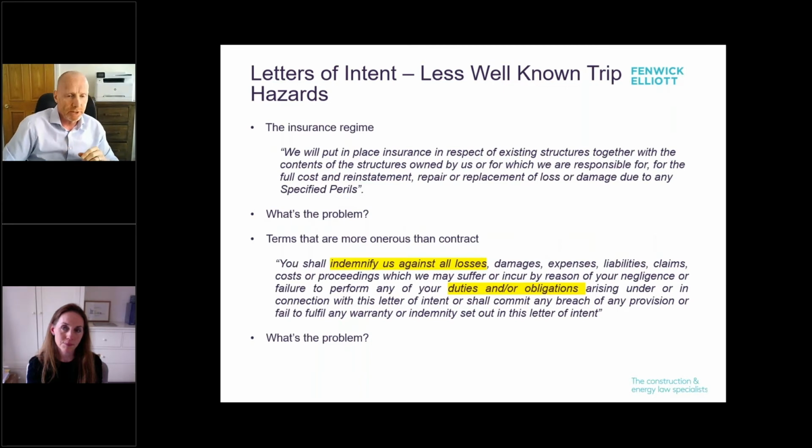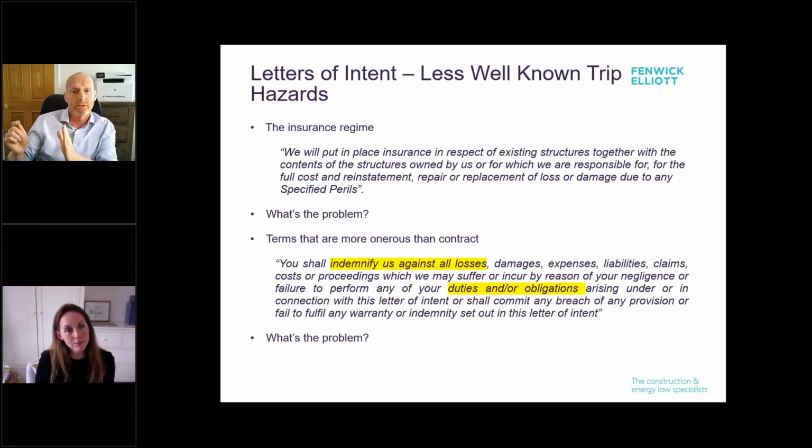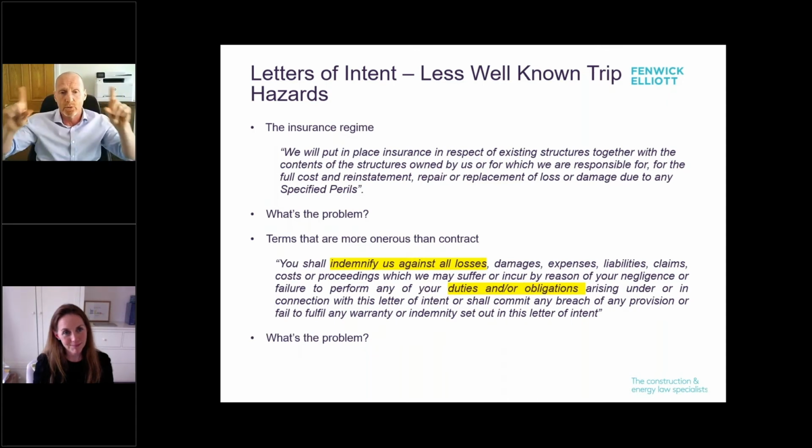Touch on now, again, back to Lucinda's point really about this 120 pages of a building contract is there for protection. So Lucinda mentioned the fact that it's nice to have in there a little bit of limit of liability you might try and squeeze in if something goes wrong. The thing that's really important is insurance in building contracts. Anyone who listened to my webinar, I think it was last November, on options A, B, C in JCT insurance. JCT insurance option C is quite useful for a contractor because in effect it can say, even if we are unfortunate enough to burn your building down or flood your building, that's not our lookout. The logic being that the contractor gets the benefit of the overall policy.